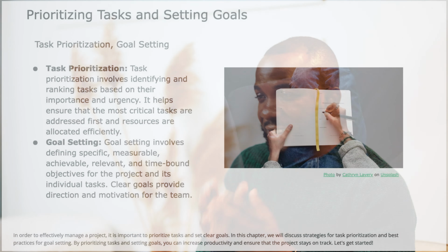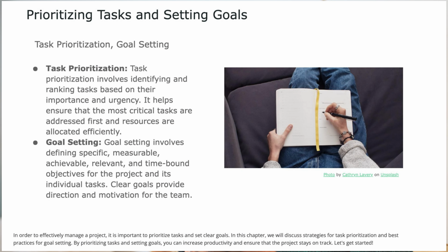Once you have listed out all the tasks, the next thing you should do is identify what tasks are on the project's critical path. Doing this will help you identify the key milestones along with the necessary sequence that you must meet to complete the project. Once you have identified those milestones, you should map each task to a milestone within the project. This helps understand what tasks should take priority.